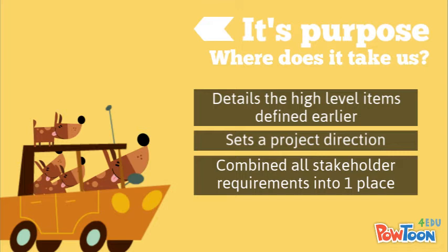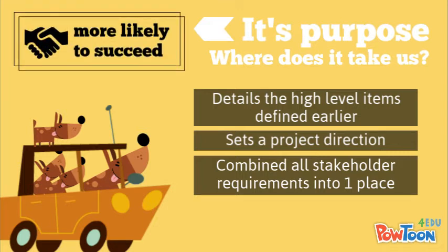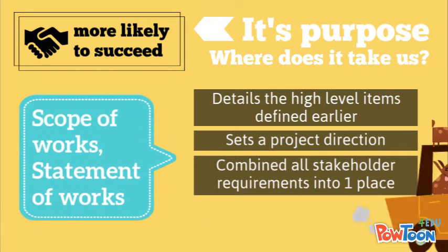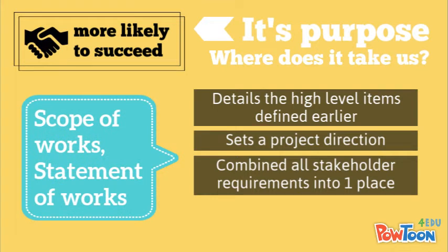It also helps a project to succeed. Research shows that a poorly defined scope or mission is the most frequent barrier to project success. It's also sometimes known as a scope of works or a statement of works. These are terms more often used in the construction industry.